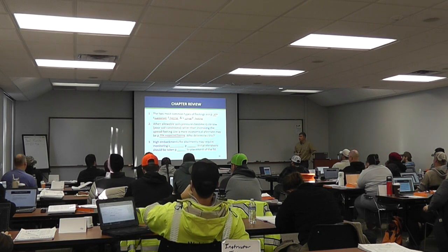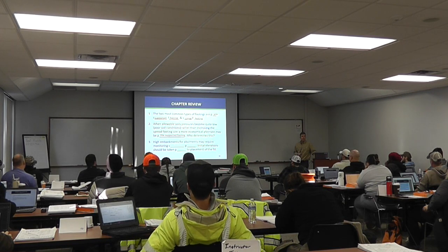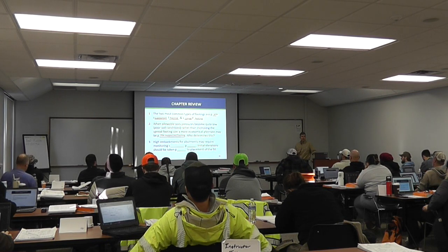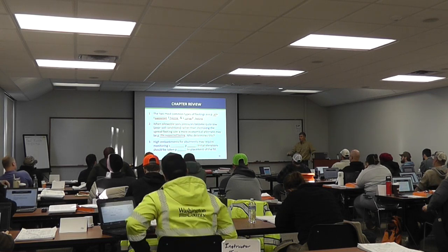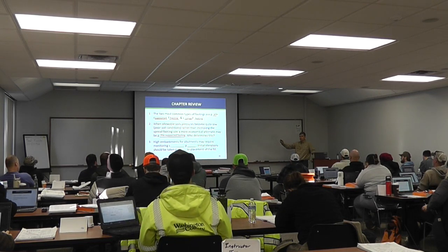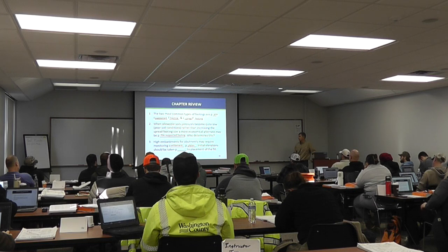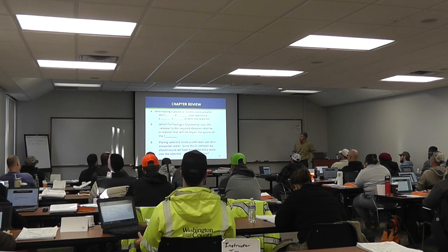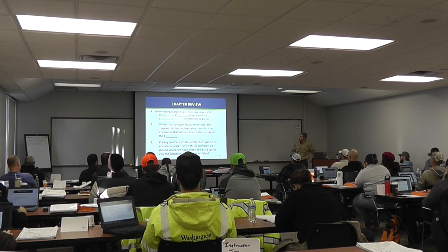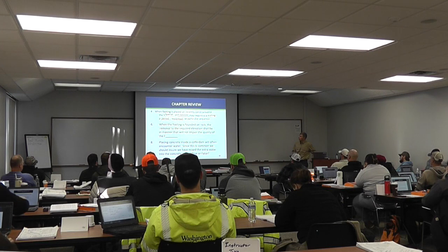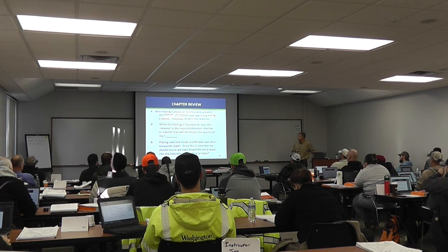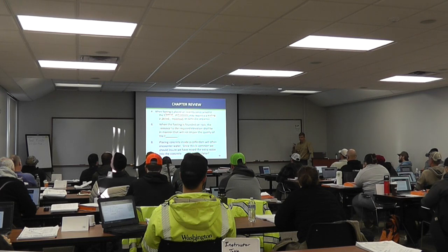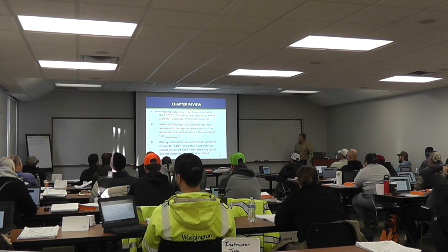Initial elevations should be taken when? Prior to any fill. One of the bigger problems is you start putting your settlement plates up and you haven't taken the initial reading. So take it prior to your placement of the fill. When a footing is placed on recently constructed fill, what kind of provisions? Special provisions may require a waiting period, overload, or particular seat. So again, on our bridge we have 72 hours, but there may be different things on your bridge.